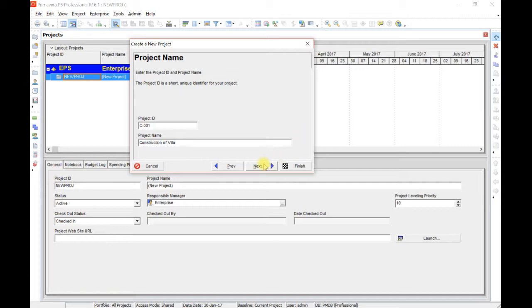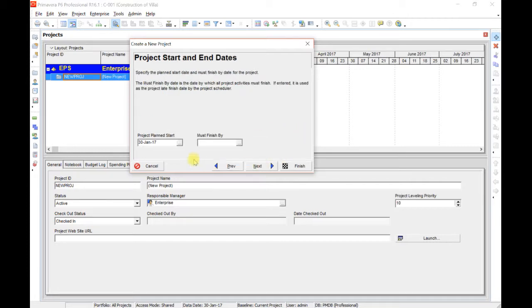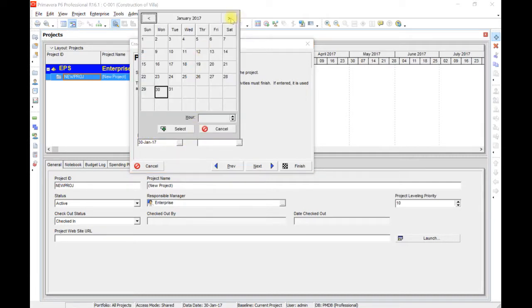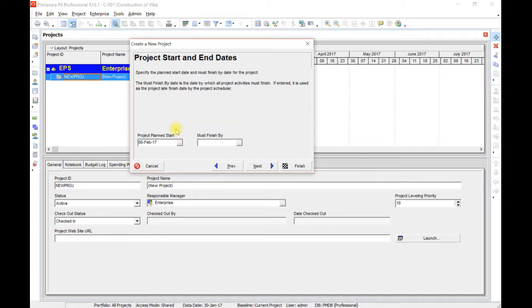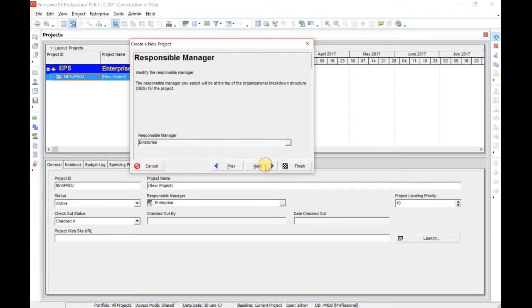Go to Next. Project plan start date. Let me assume that the project plan start date is 6th of February 2017. Must finish by. If you know the project finish date, enter it here. But it is still advisable not to enter this must finish by date. For the time being leave it empty and click Next.